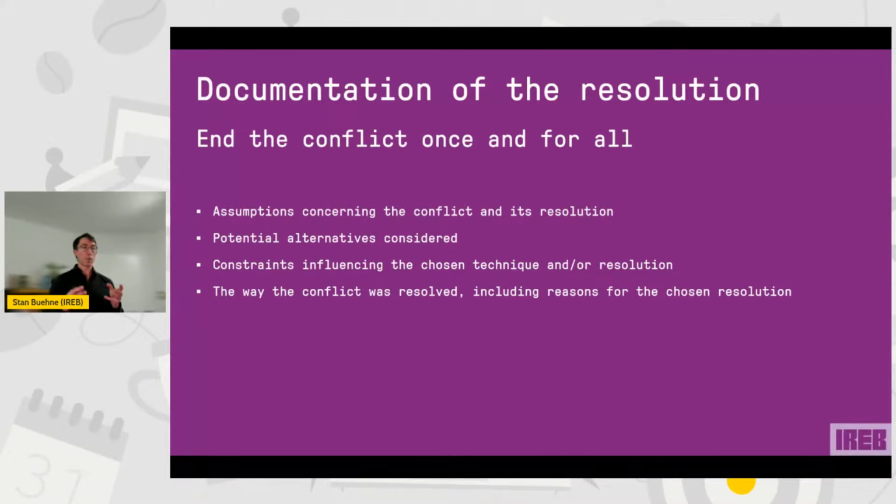And you should also document the reasons for the chosen resolution, because otherwise, if you don't document the reasons, it's pretty much an issue that you will over and over come to this point, and that people say, hey, that's not the reason why.